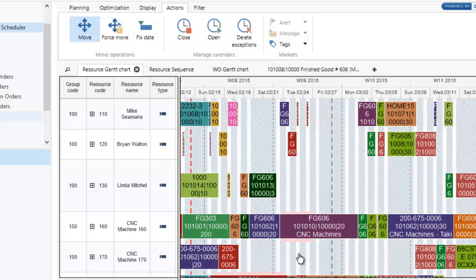Now watch what it does. Hopefully you can see this. It puts a little kind of a pink border back here behind this number, which indicates that that machine center is closed. So the duration of this work got longer. It kind of pushed the length. I call these stickers. This sticker, think of like a whiteboard and you're sticking stickers on the whiteboard. That got longer, okay, because of the downtime. The work still had to be done, so this gets longer, but guess what?